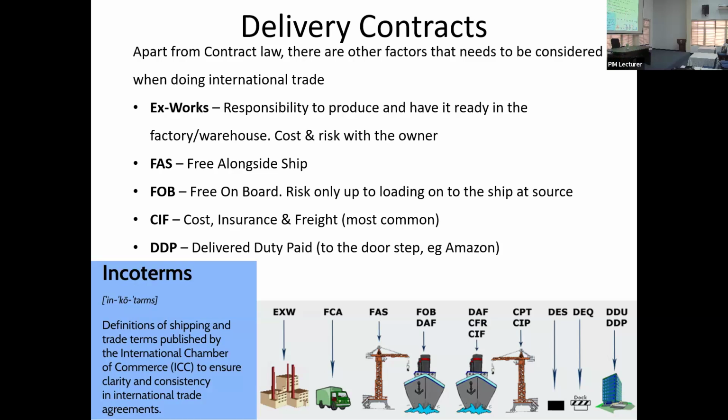Ex works means when you buy something, the manufacturer says, I will manufacture it, it's in my factory, come and collect it. You take all the risk. I'm not going to take any risk. You come and collect it. So bring your lorry and take it. So that is ex works. Now, when you are pricing, with ex works you need to consider other factors.